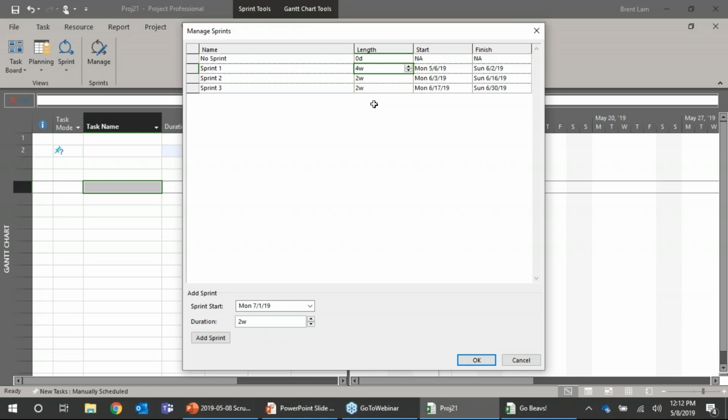4 weeks gives you a little bit more breathing room to operate in, and it also, in fact, cuts down some of your ceremonies, such as the retrospectives. Instead of having 2 retrospectives in 2 sprints, you now only have 1 retrospective. So in my opinion, it makes it a little easier, but again, you should customize it, and there's certainly value to 2-week sprints, especially if you're doing maintenance and enhancement work where, say, you have a website and you're doing really small but incremental builds to that, and you're giving value immediately to your customer, your clients, or the business part of your teams.